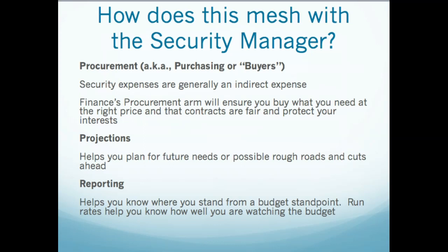He's got a problem. I needed to have at least 4 different channels so that one group can be on one channel and another. You give that whole list of specifications to your procurement person, and they go out and find potential products that can do that. They will give you some suggestions. Here's Motorola, here is Sony, here is Samsung, here is whoever. And once you decide which one you want, then they go out and negotiate the price for you.